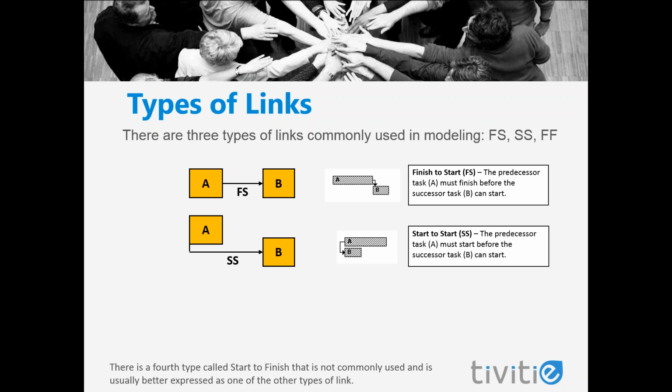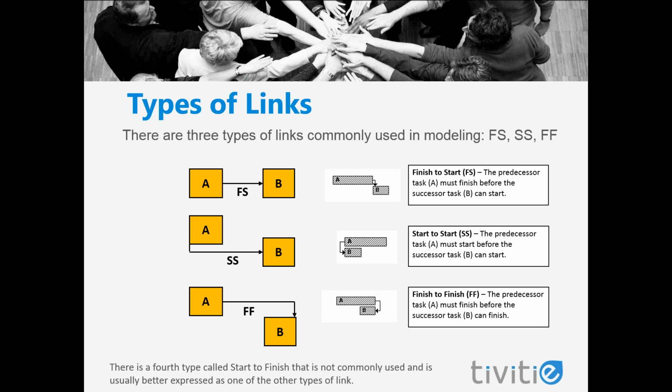For start to start links, the predecessor must start before the successor starts, or you can think of it as the successor cannot start until the predecessor starts. This means that the earliest the successor can start is at the same time that the predecessor starts.